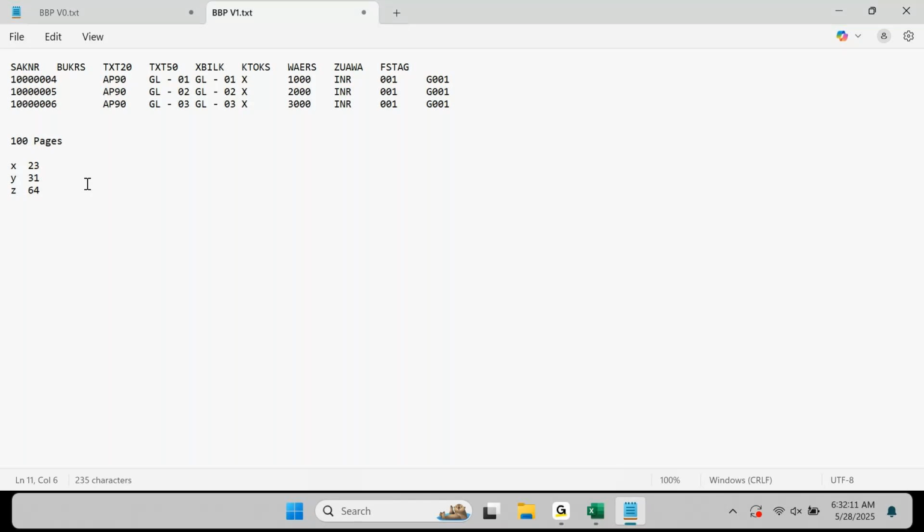Every time you give a revised document, it does not mean every time I will read 100 pages. Am I correct? Yes, sir. You need to let me know, you need to identify and highlight the changes and corrections made. Accordingly, I will go through those corrected points and then confirm.